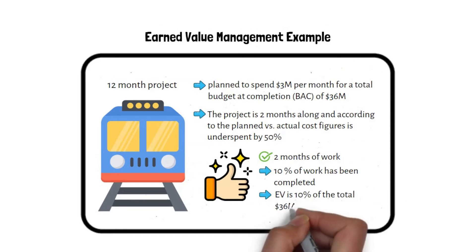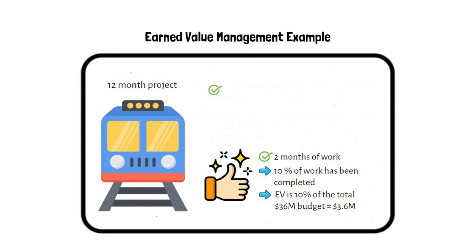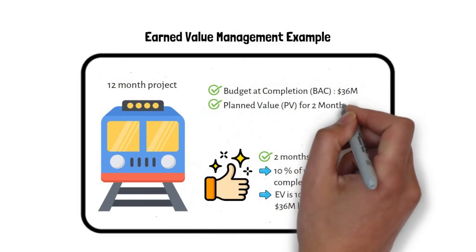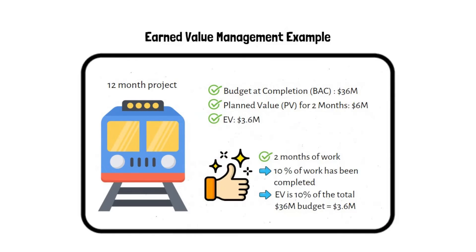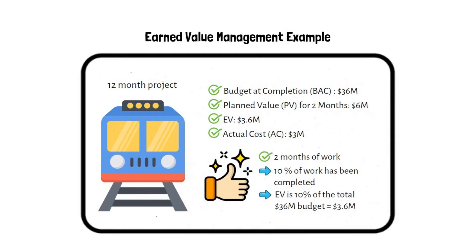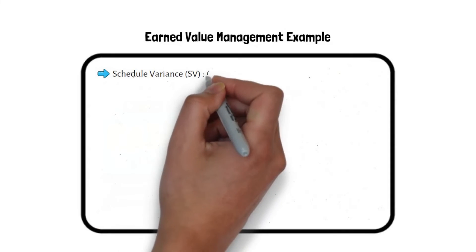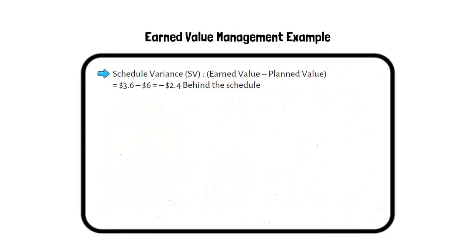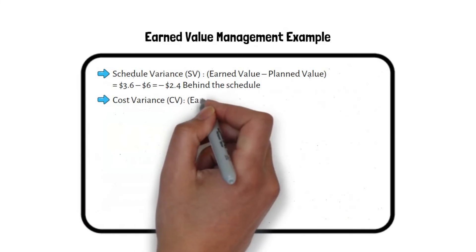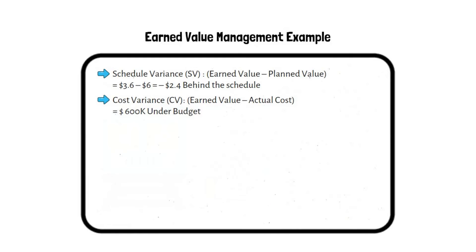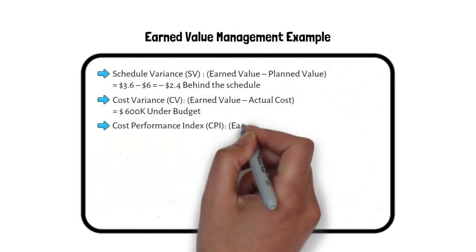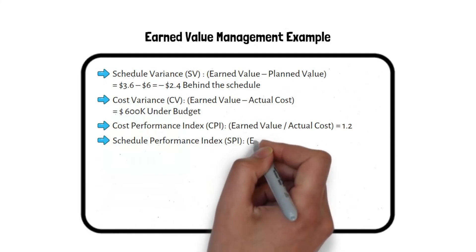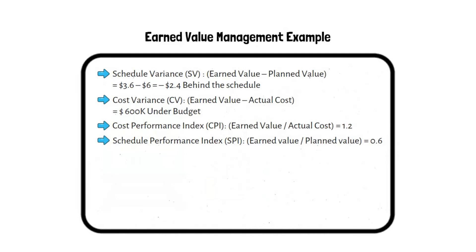But after two months of work, only 10% of work has been completed. So Earned Value is 10% of the total 36 million dollar budget, which is 3.6 million dollars. Budget at Completion: 36 million dollars. Planned Value for two months: 6 million dollars. EV: 3.6 million dollars. Actual Cost: 3 million dollars. Schedule Variance: EV minus PV equals 3.6M minus 6M equals minus 2.4 million dollars — behind schedule. Cost Variance: EV minus AC equals 600,000 dollars — under budget. Cost Performance Index: EV divided by AC equals 1.2.